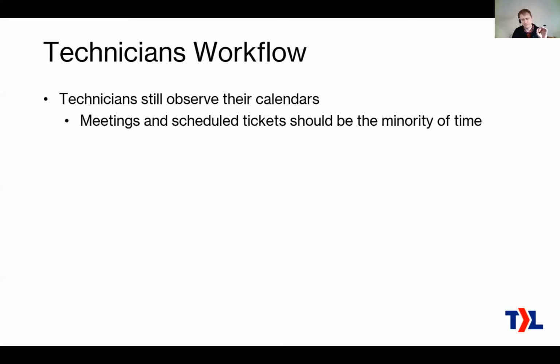The difference, compared to calendar scheduling, is that instead of their calendar being 99% scheduled, their calendar is like 10% scheduled, 20% scheduled, maybe at the most, unless it's your on-site technician who needs to have most of their day scheduled. But anybody who's working in the office, most likely they're going to have most of their calendar free now. Okay, so that actually gives them a lot of time to work through their work from the Kanban board.